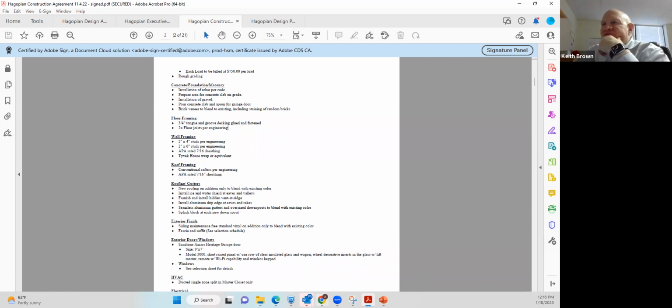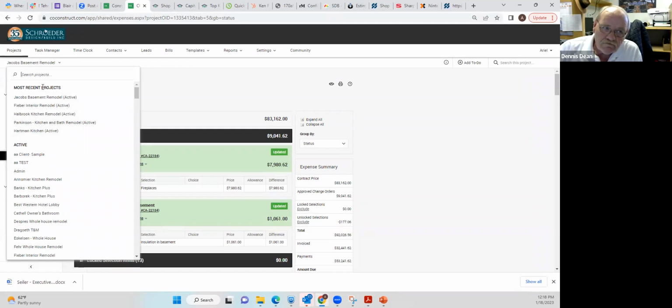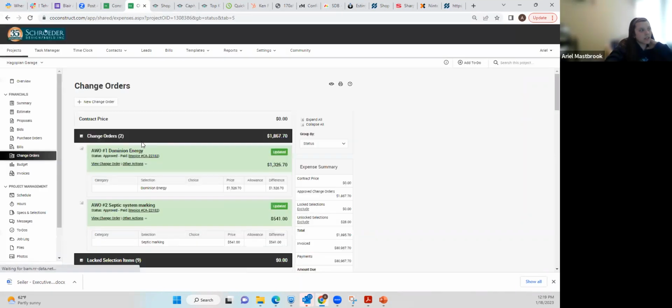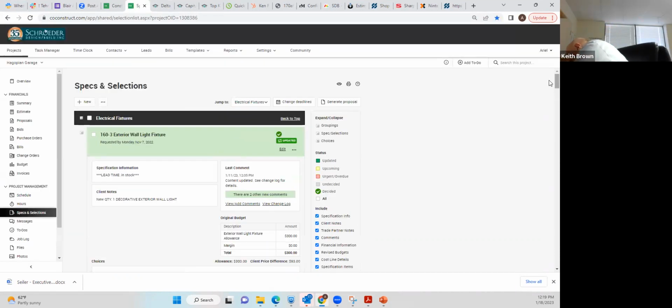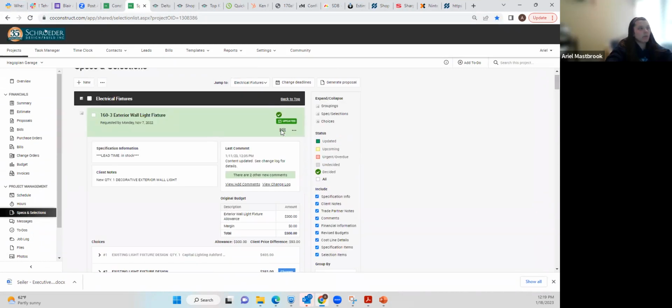The question, Debbie, why I'm saying 3/4 ton group, are we specking a certain type of tongue and groove decking board, like a Vantech or anything like that? No, that's just for the contract. Part of the contract is the selection sheet. We'll print this and include it in the contract. So anything that's in the selection sheet, that's what's in the estimate, which is in the contract. So we make it a whole package.